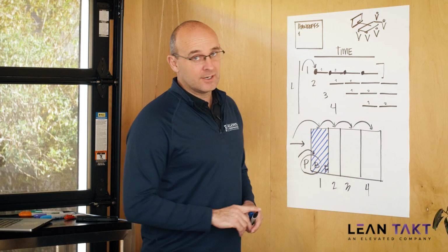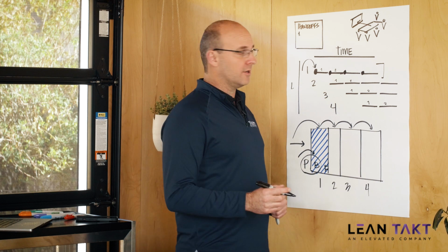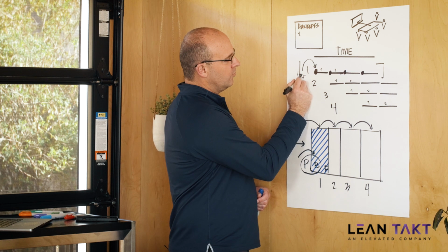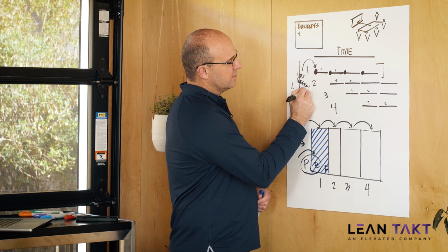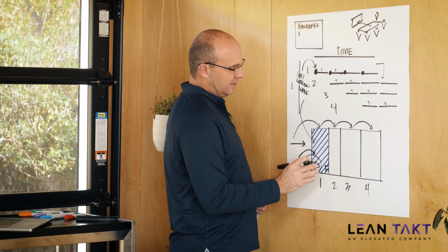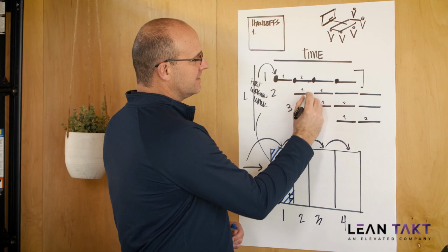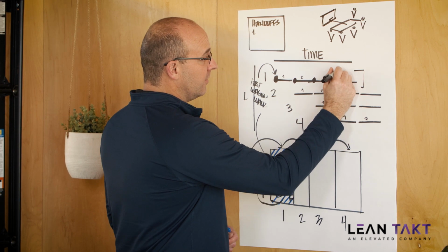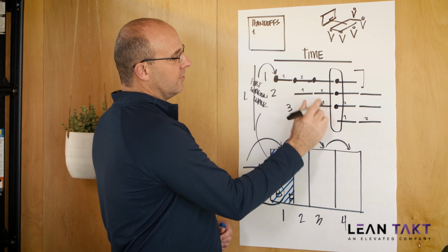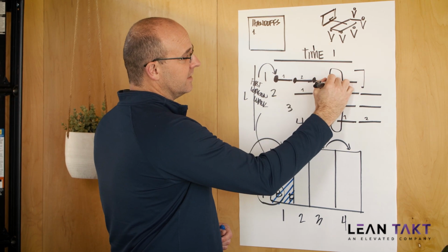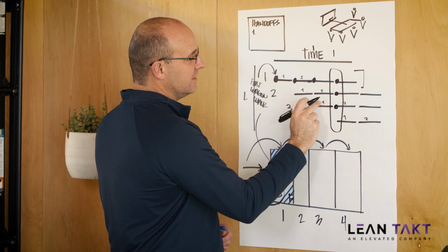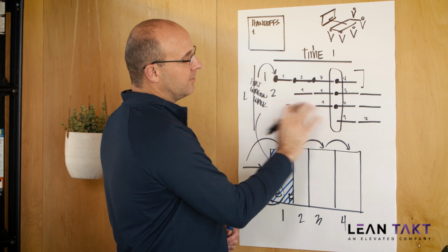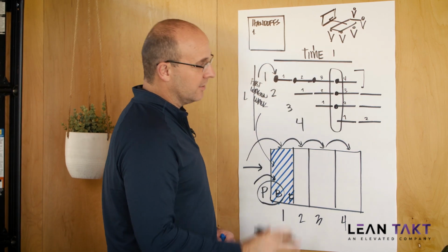The second type of walk that I want to mention to you is called the handoff walk, right? So this one right here, I'll just label it. This was your first wagon walk where you went out in the field and checked the work starting in this first zone. The second type is actually your, and I'll just do it over here for clarity. This is called a handoff walk, and it happens when your TAKT time here is going to finish, right? And all of these activities here, 1, 2, and 3 are going to finish, and we need to bring in the trade partners behind us and keep that trade going.